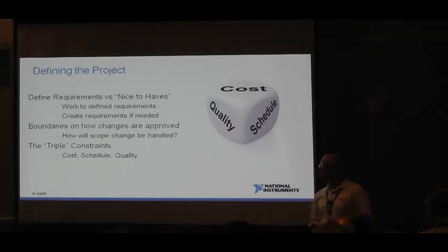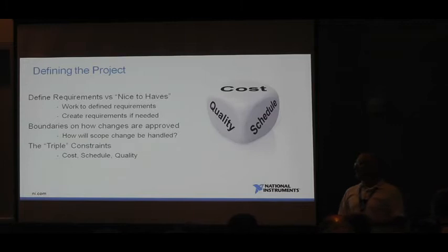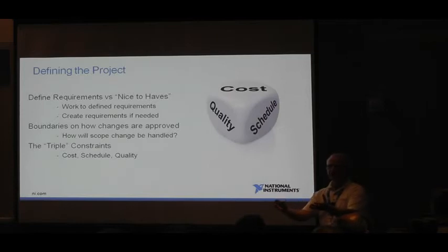Yes, sir. How often do you deal with incomplete requirements? Never! The question was, how often do you deal with incomplete requirements? And that happens very often. We've had projects at Surtech where the customer will say, I want this system, but there aren't any real details or things lined out about how you should implement that. So we will actually create requirements and then say, here, what do you think about those? And then do a negotiation to come to settle on a set of requirements.